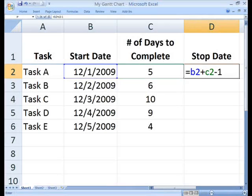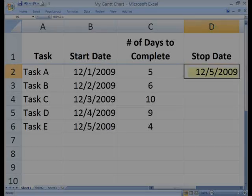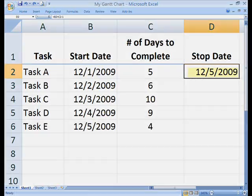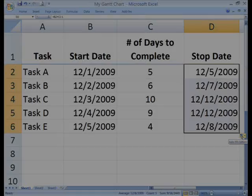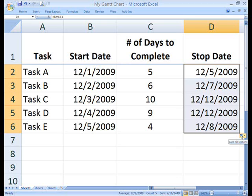In cell D2, enter the formula equals B2 plus C2 minus 1. Press enter and the stop date is calculated. Copy the formula all the way down the column. Now that our table is completed, we're ready to create the Gantt chart.